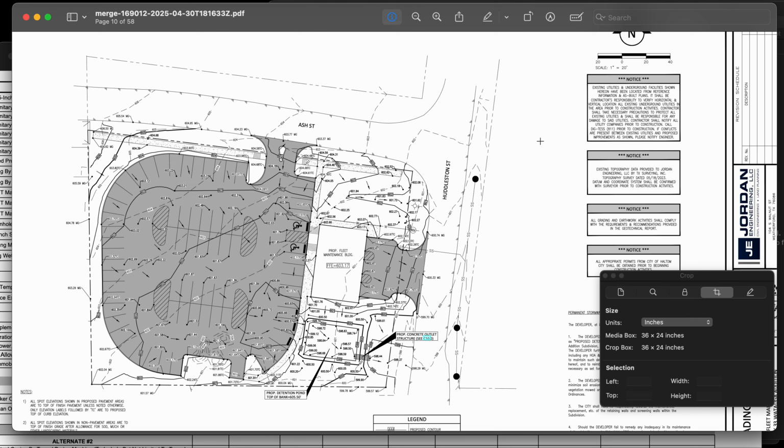If you start exporting soil and you're still not done and you've reached all the cubic yards, the GCs have told us, oh, well, it's because you're not loading your trucks up all the way, or because you guys are trying to cheat us on the loads and all that. And there's just ways to avoid that. We just say, you know what, this is our price for 50 loads. We believe it's going to be 50 loads.